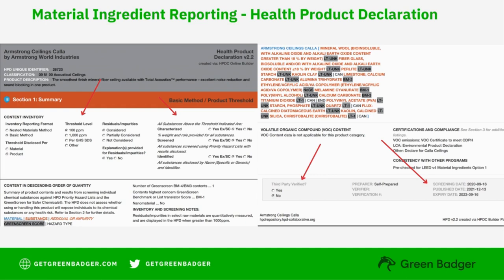Here you're looking at an example of a health product declaration. You can see in the upper right that it's labeled a health product declaration. Even though these run up to 14 pages and you should include all the pages, there are just a few key pieces of information on pages 1 and 2. First, check the threshold level — the material must be inventoried to 100 or 1,000 parts per million to be LEED compliant. Also, the substances in the product need to be characterized and screened, so those boxes have to be checked. Make sure the date is valid during construction.